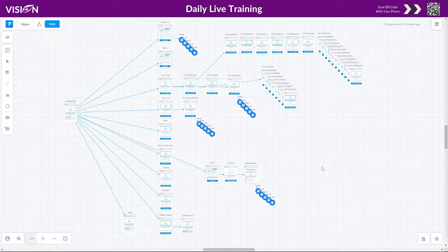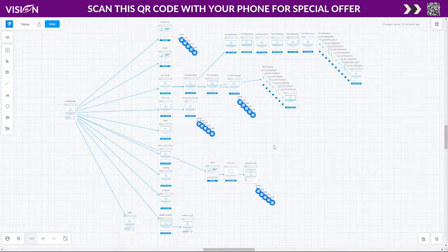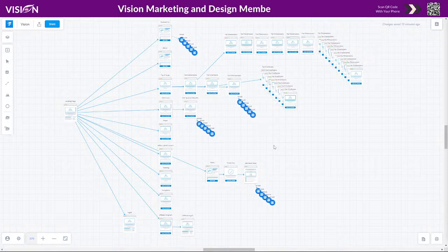You need to be specific, and I experience this in our local business as well. If we quote a job and it's not specific, I always use the example of when we did a quote one time for removing bushes. Well, they removed the bushes. Well, the client thought that meant to remove the stump for the bushes, and that's a very reasonable thing to think. However, she was very upset that we didn't remove the stump, but the stump is an extra charge, and so it just got into this big thing. And I experienced the same thing with web design, or Google Ads, or anything like that. You always run into scope creep.